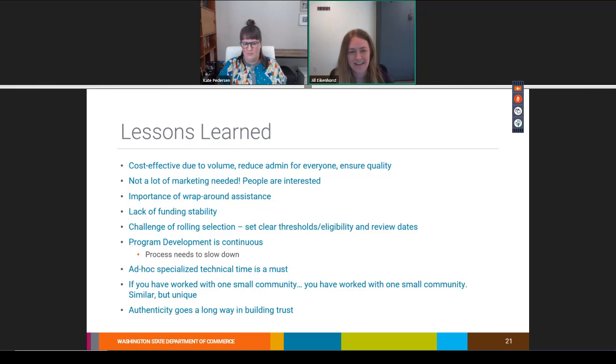The next lesson for me is that compared to competitive grants, this has been cost effective due to the volume of the studies. It's reduced administrative costs and time for everyone. So that includes Commerce, the consultants, and the communities, because there are fewer RFPs and contracts going on. And we're also able to ensure quality by bringing in technical resources to select and manage consultants where communities may not have the expertise to know what to look for.